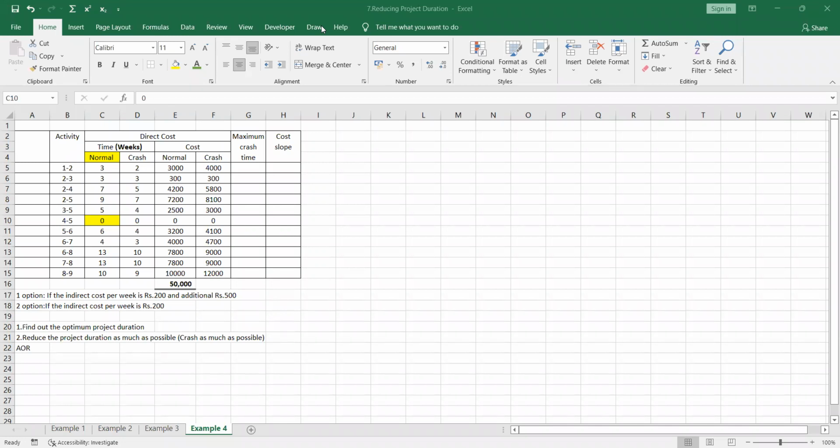Those are called dummy activities. Can you remember? Dummy activity, the activities which are not having any time. So that means when the normal time is 0, it is a dummy activity. Therefore, for the dummy activity, we are not going to assign any letter, right? Therefore, you have to eliminate that, and the dummy activities, we are drawing it as a what you call